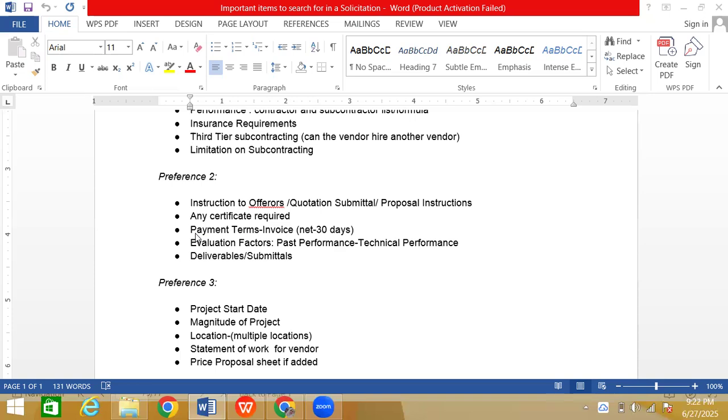So what do we do in case the vendor is asking for a deposit payment? We ask them, hey, are you able to lower the deposit to maybe 10%, 15%, 20%, 30%? Anything lower, but up to 30%. And that is only possible if the total cost quote that they give you, the total estimate, is low. If it is like 100K or something, even that much deposit is not possible. That is too much of a risk.